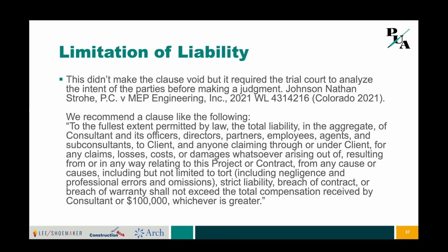And so one thing you should be cognizant of is if you're negotiating a limitation of liability tied to your insurance policy, is it tied to the insurance policy or the amounts available to you at the time of settlement or judgment, or is it the insurance coverage required under the contract? Sometimes you may have coverage in excess of what's required under the contract. So giving thought to how you draft and characterize your limitation of liability language and provision is going to be